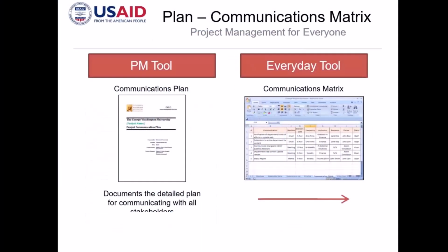Okay. So for me, I also normally have a communication plan, right? As I've said earlier, normally I have a stakeholder matrix, right? So all of my major sponsors and all of the resources that are included in the project team, I keep a matrix or a list of all of them so that when I do a communication plan or a status report, all of them should be included in that status report.